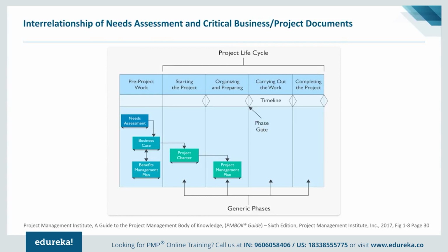At the same time, he is then formally engaged on the project. So actual project activities will kickstart once the project charter is in place. Before that, whatever activities happen are basically categorized under pre-project work activities. Right from idea generation or need assessment, to coming up with a business case, or for that matter writing the benefit management plan, all these are nothing but the pre-project work. This pre-project work is important because ultimately it is the one that will trigger the project. And once we have a project charter in place, then we kickstart the project activities.